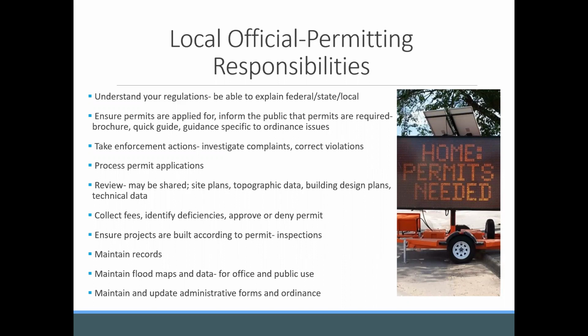And so having this inter-office review process and working with other departments and having the inter-office sign-off procedures so that you can make sure that everybody's on the same page with development, because things in the floodplain often need other permits from other departments in your community. So just having that communication and making sure you're on the same page. We have had one department issue a violation at the same time a different department gave them their certificate of occupancy, which created a lot of confusion. So just making sure you have a consistent message and making sure people are applying for permits.